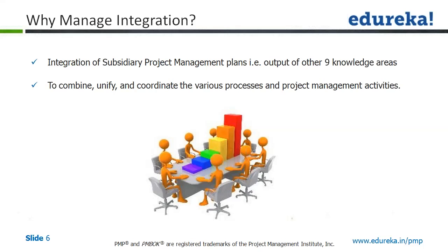You remember there are 10 knowledge areas. The first one is integration, and the remaining 9 each produce management plans, which are called subsidiary plans. All those plans have to be integrated and merged to form the project management plan. That is what Develop Project Management Plan covers.